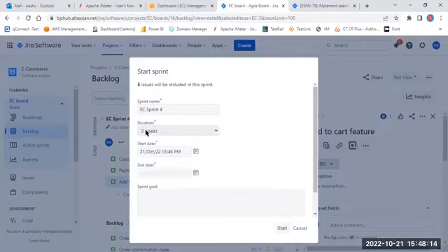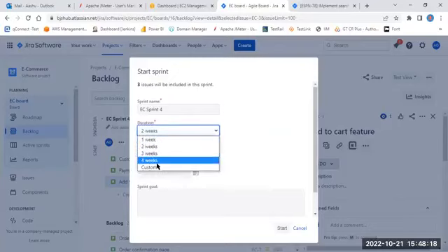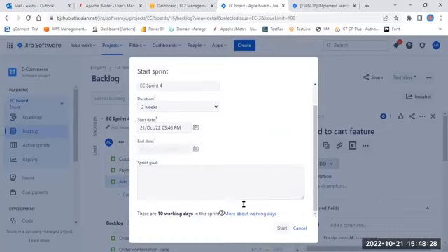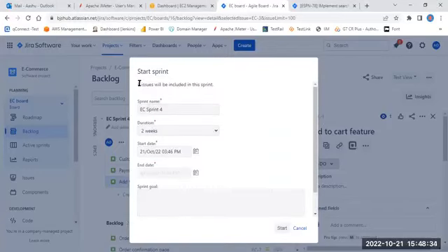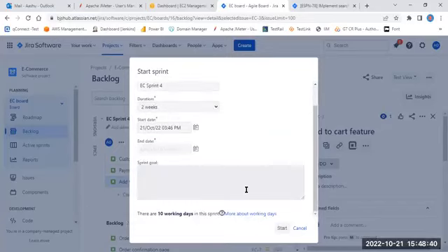See, that is decided by the management, whether they need to follow 2 weeks or 1 week or 3 weeks or 4 weeks. The default which most companies follow is 2 weeks. Within this 2-week period, we have to develop everything. So what we have done, guys, is selected 3 user stories, assigned the tasks, and updated the story points. Now again we will start a sprint.